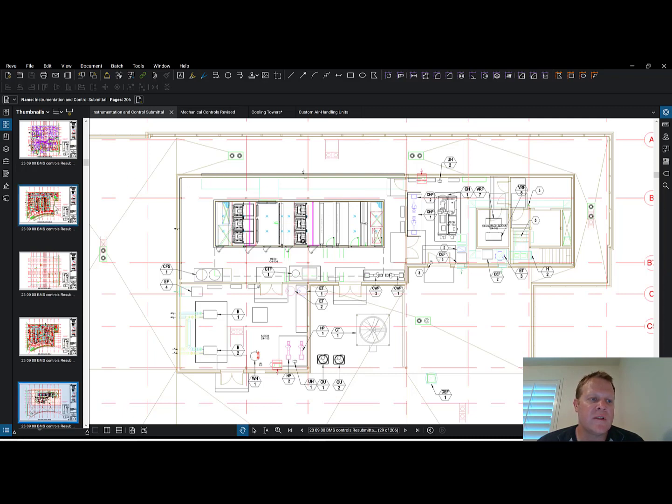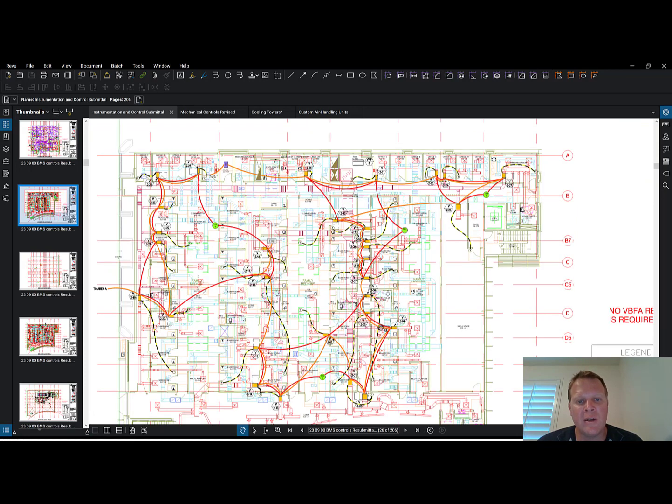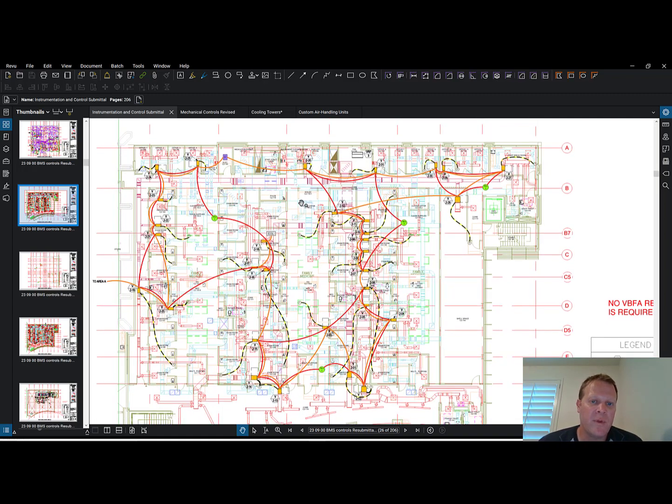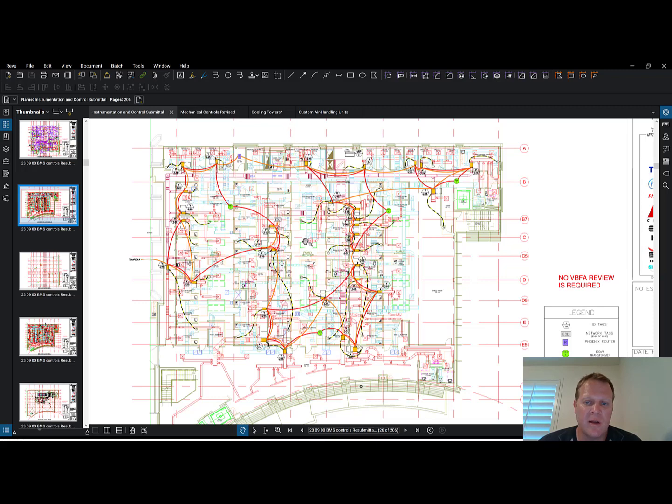Now, say we're doing a typical construction and we're trying to work bottom to top. This doesn't mean that as soon as you have the ductwork and the wiring done and power on here, this works. It's operational, but that doesn't mean it's functional. You might have multiple floors to be done before we can say, okay, we can function as a system, or maybe you can. But the point is, you've got to understand the system well. And I've seen that.